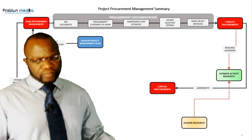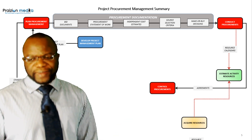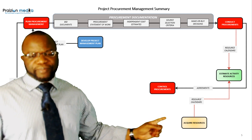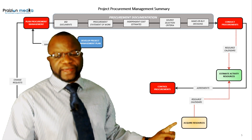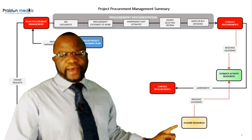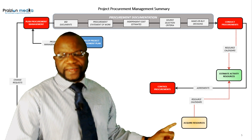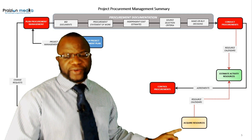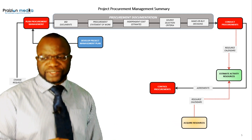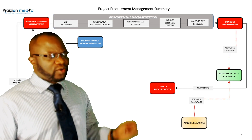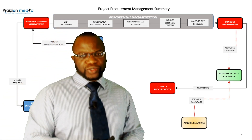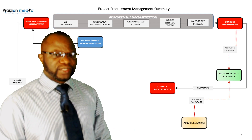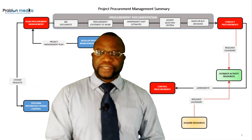Acquire Resources also feeds back into Estimate Activity Resources with resource calendars. So resource calendars come from Acquire Resources, but they also come from Conduct Procurements. You can see a lot of interconnection points — things flowing into one place. Estimate Activity Resources gets resource calendars from two different places, which is exactly what this map shows you. The procurement documentation also goes into Control Procurements.